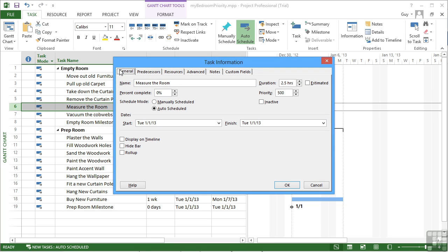On the general tab, we can see the priority, and we can change the priority. So I can make this task go down or up. You can see the little arrows go up in 20s, but you can actually click in and type your own value as long as it's between 1 and 1000.